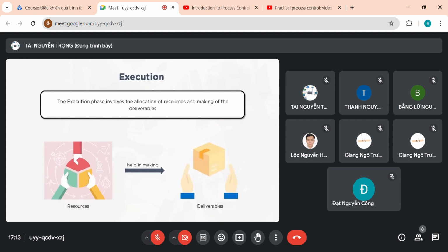And at the same time, a sign-off has to be obtained formally and everything should be summarized, with a good handshake with the project stakeholder, mainly the business or customer. Also, disseminating the team means you will dismantle the entire team and send them back to their specific units or specializations, and they may get assigned to a new project, or if it is functional, they can go back to their functions to do their functional activities.